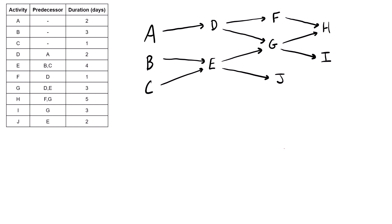Looking at the rough sketch, it's looking good — there are no unnecessary crossovers of our arrows. We can see that activities A, B, and C are all our initial activities with nothing before them, and activities H, I, and J are all the final or finishing activities with nothing that comes after them. That's pretty critical to pay attention to, as we'll need to figure out which one determines the late finish for all of them.